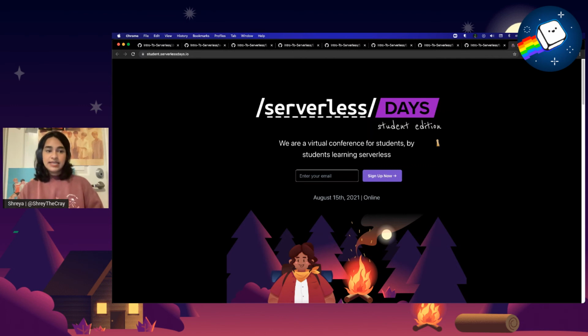Really recommend, if you think something is going to take X hours a week, personally, I've been told to multiply it by 3. Other developers have a different factor that they multiply it by. So talk to your mentors, see how they determine how much time their tasks end up taking. But yeah, time is a skill that you also have to develop in this program for yourself. And it's okay if you get it wrong. If you realize that you completely underestimated the time it was taking and you need to reevaluate that later, totally okay. No one's going to judge you or stop you or anything like that.